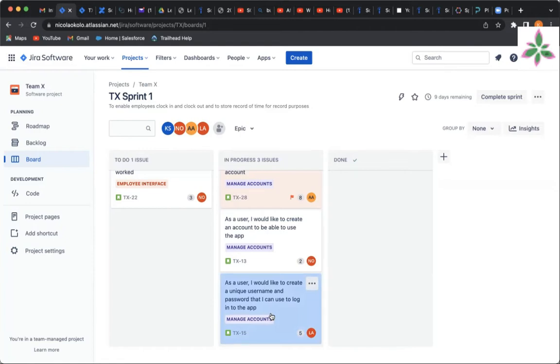Welcome to the product meeting again. It's going to be a 2-hour time box meeting. We're going to attempt to clarify and split the higher priority product backlog items for the next sprint. Is that okay? Yes. I'd like us to recall that any work that represents value or consumes time and attention from the team may be worth listing on our product backlog.